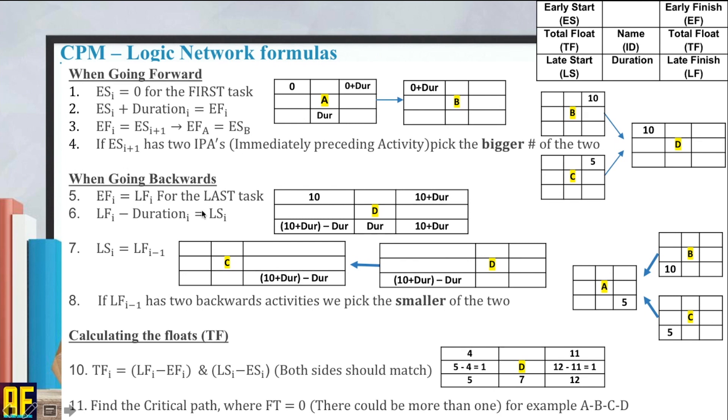Then once I'm done and I'm going backwards, I'm saying that my EF equals LF for my last task. And now that I'm going backwards, LF minus duration equals my LS. Now when I'm going backwards between activities, my LS equals LF of i minus one, which means the previous activity. The LS of D equals LF of C. If my LF has two backwards activities, this time we pick the smaller of the two. So if I have LS of 10 and LS of 5, this time when I'm going backwards I'm going to pick LS of 5.